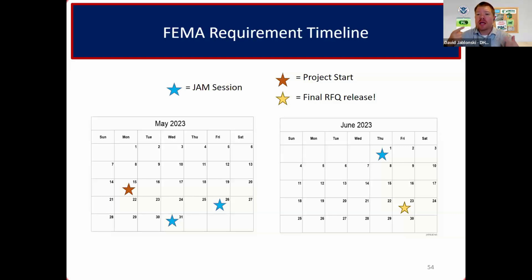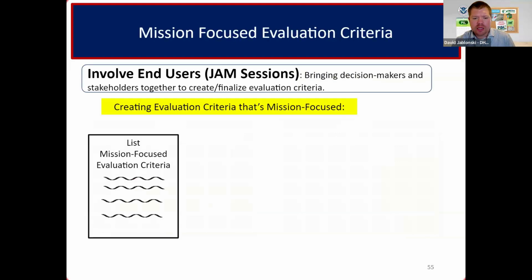And then while they got their approvals, they got feedback from vendors on the draft solicitation. And then they incorporated that feedback in the solicitation itself, which just kept them from having to do amendments when the solicitation got out there. Again, it saved them time. Got all their approvals, made changes before the solicitation went out, then posted the final RFQ. Just 61 days after this, they got this awarded on time. So let's go to the next slide here and look at how they do this.